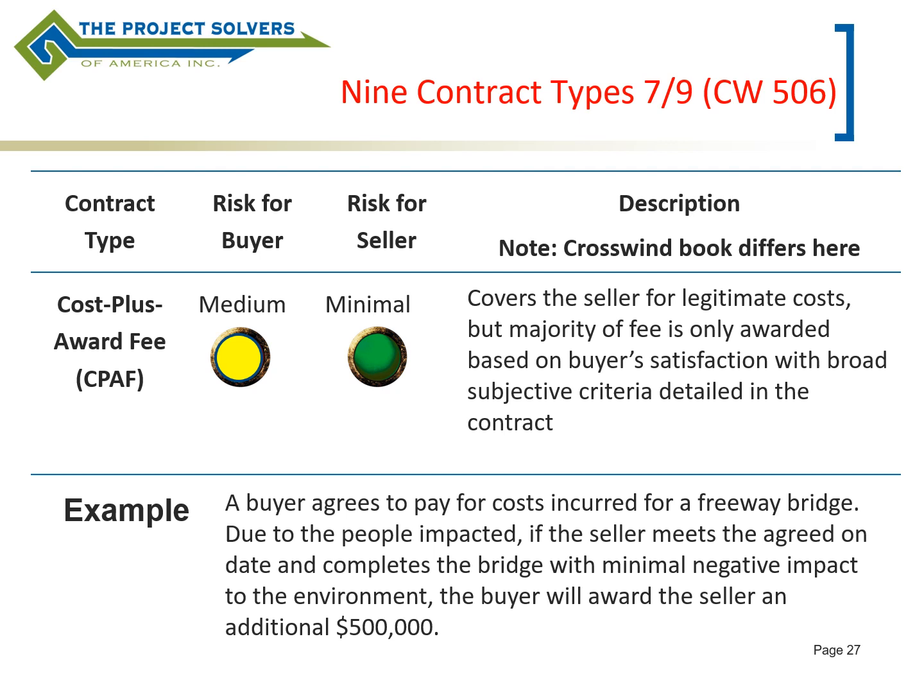And then there's cost plus award fee, and people generally get cost plus incentive fee and cost plus award fee confused, so be very careful about this one. Award fee deals with very subjective criteria, whereas an incentive fee is very quantitative, very, very objective criteria, such as you have to complete by a certain date, and then you either did it or you didn't. But with an award fee, whether you've met that criteria is purely up to the buyer's discretion.